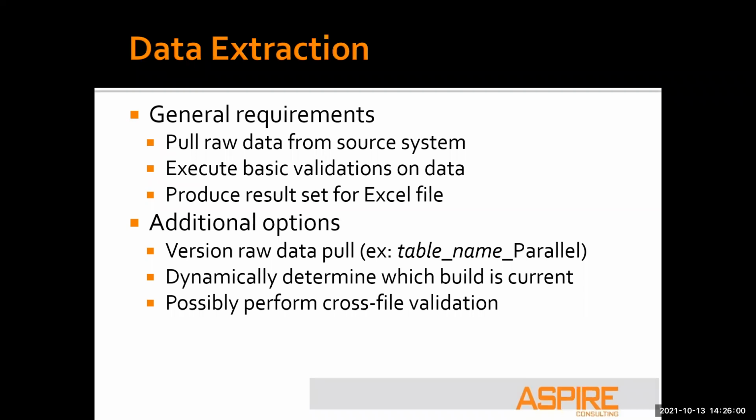Or you might want to say, I have somebody in the additional jobs file, you better have them also in the hire file, because you can't just have additional jobs. You have to have a primary job in order to have additional jobs. So doing cross-file validation, you could do that in these scripts as well. It introduces some timing challenges, but those are things that you can work through and get your timing right so that you can do those types of things.